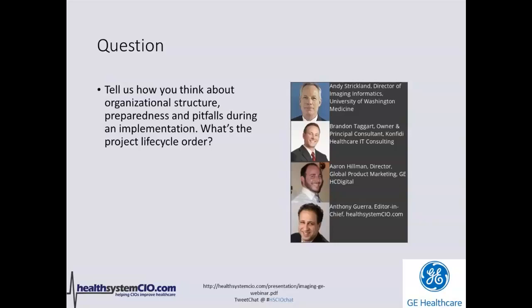What this does is the VNA provides a foundation to consolidate that holistic patient imaging record along with all of their other relevant metadata that goes along with it. So by making sure that you include stakeholders from those departments that you want to strategically include from the start, or all of them, however you want to lay out your enterprise imaging strategy, make sure you have stakeholders to get that buy-in, because if they are bought into the implementation and design process, they'll be bought into the using of it as well, and that goes a long way to the success of a project.